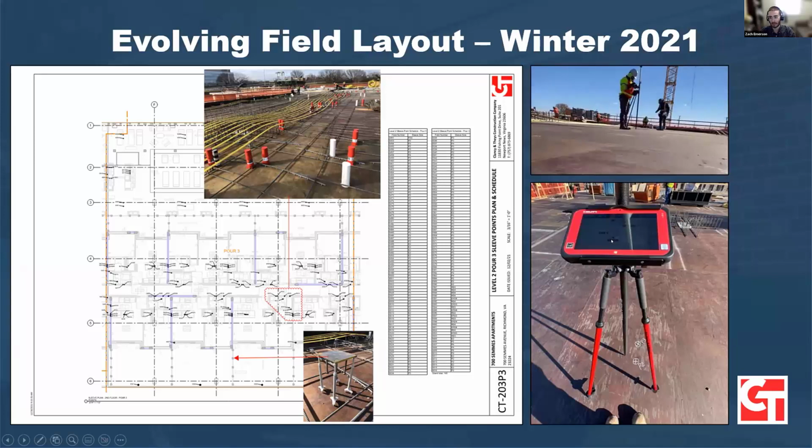And each time you lay out a point, it directs you to the next closest one, which really ensures that you never miss a sleeve, and obviously really speeds up that process and allows you to get all this layout completed well ahead of any mild steel reinforcement, or especially any post-tension tendons or other structural elements going in.